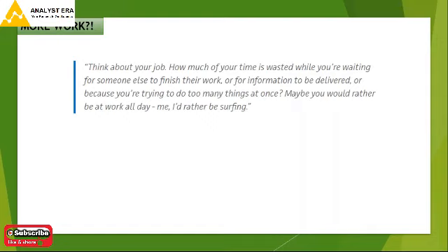While we are here, there is one more thing. Who is estimating the tasks? I will break down my epic into features. A feature is broken down into user stories. A user story is broken down into tasks. Who is estimating the task? It is the software engineer. Who is it that is estimating? It is the software engineer.